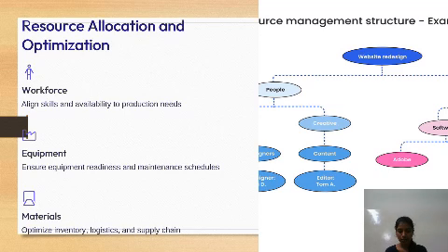Next one is resource smoothing. It optimizes resource allocation within set limits to promote efficient resource use and balance workloads. This can help avoid resource peaks and valleys and prevent bottlenecks. The next is reverse resource allocation. This is useful for projects with a fixed deadline or that require specialized resources on specific dates. Managers schedule resources for critical tasks first to ensure specialized resources are available as planned.